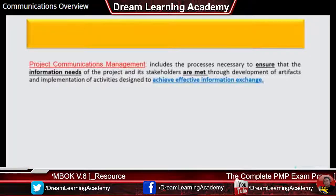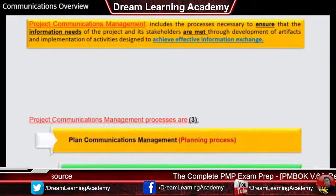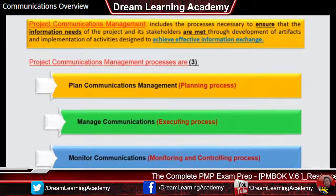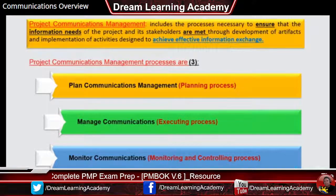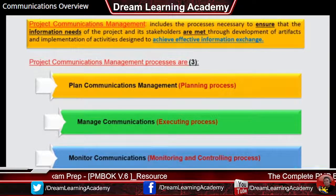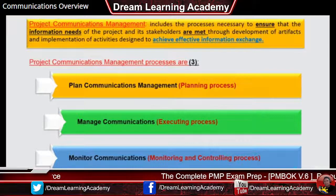In this lecture, we will have an overview of Project Communications Management. It includes three processes: a planning process that produces a communications management plan, an executing process called Manage Communications focusing on carrying out the communications management plan, and a monitoring and controlling process called Monitor Communications, which checks whether project communications are meeting stakeholder communication requirements.